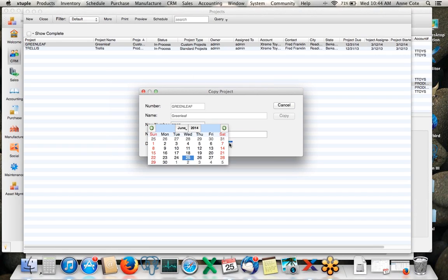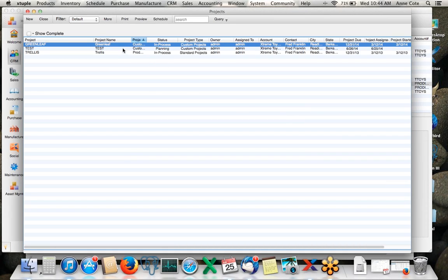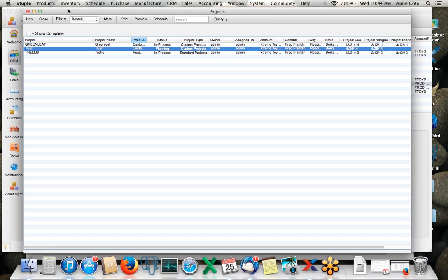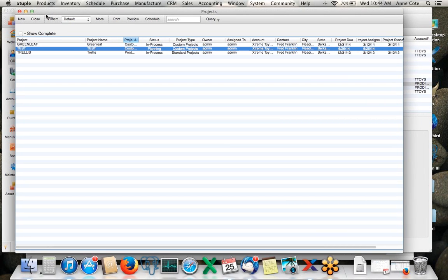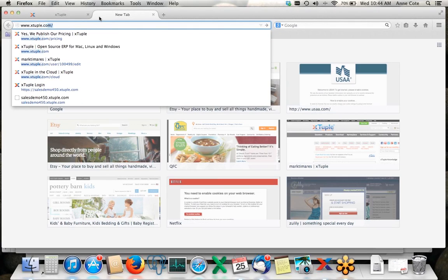Yeah, we did add a feature, so I just jumped to the list view. That's a really good question. I'm glad you brought it up. You can copy a project now. For a while, we didn't have that ability in the earlier versions of the application, but now you can basically create a project template if your tasks are fundamentally the same for every project, and just copy it. Oh, okay, that looks good. Yeah, that was a nice feature that got added.